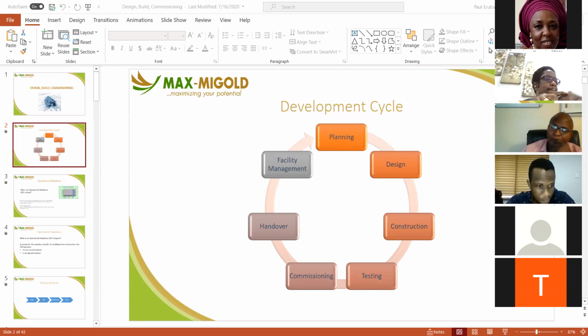So if a contract is not completely commissioned and handed over, is it regarded as still open, not closed? Well, the project can be handed over, right? Even a contract can be closed without all the commissioning done. For commissioning on projects, most of the time they will lock it to the mechanical equipment. They won't lock in the structural and the architectural features into commissioning requirements. But of course, every time you are starting out, you have a minimum expectation that these and these must be commissioned before we can close the contract.